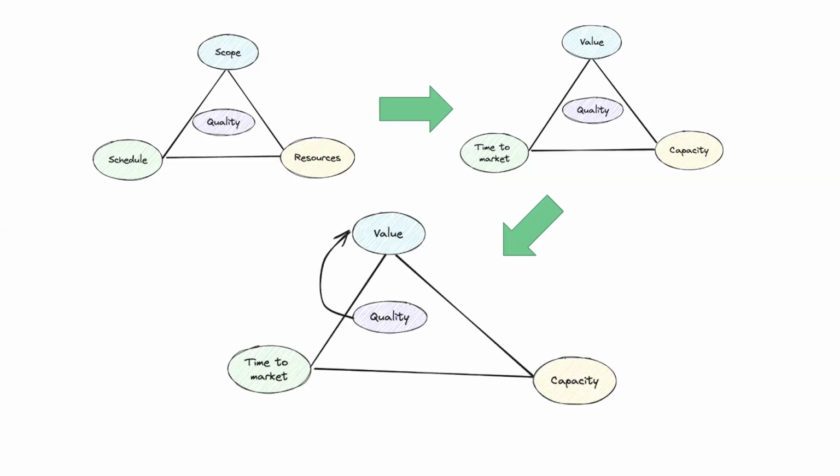So extending the time to market is really easy, right? We can say, okay, we were going to deliver it in August, but now we'll leave it till October. The consequences of that might not be so easy. There might be some angry people going, but we've got campaigns lined up and we're expecting it, and now we're going to miss the conference and that sort of thing. So I'm not saying it's easy in that sense, but to change time to market is actually just a decision. It's a business decision.